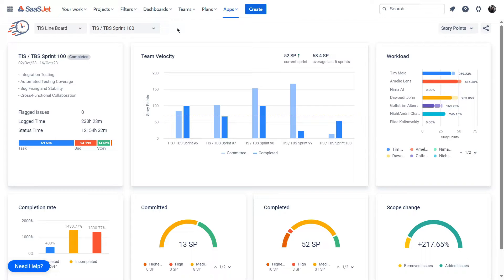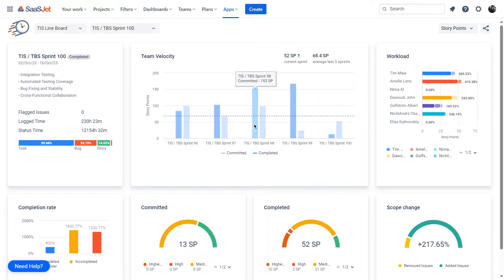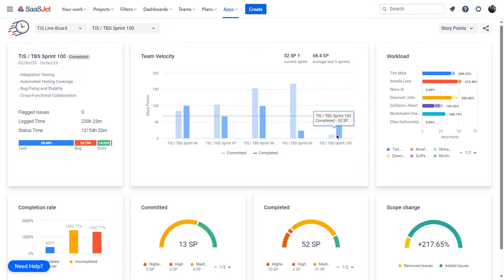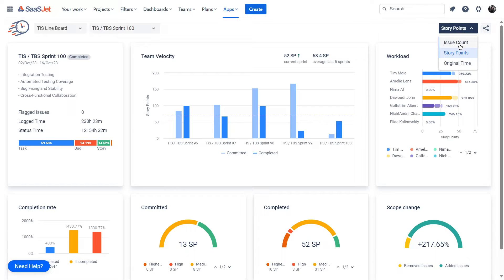The Team Velocity chart displays the committed and completed values for the last seven completed sprints, with the first sprint being the one you've chosen. The remaining sprints are arranged based on their completion dates, starting with the most recent one. You can choose to see your report by issue count, story points, or original time.